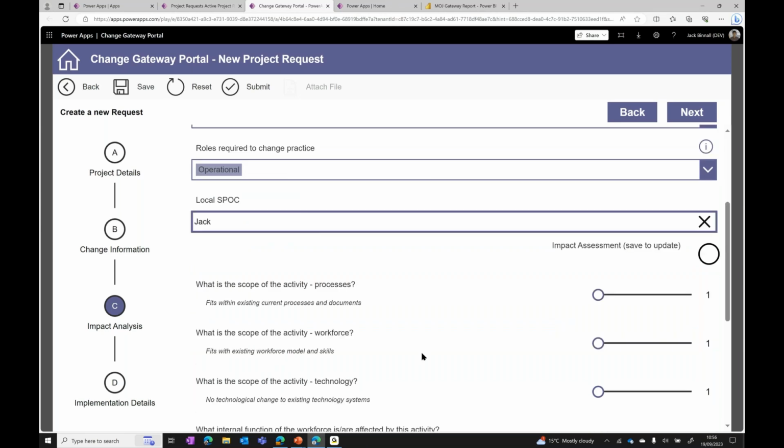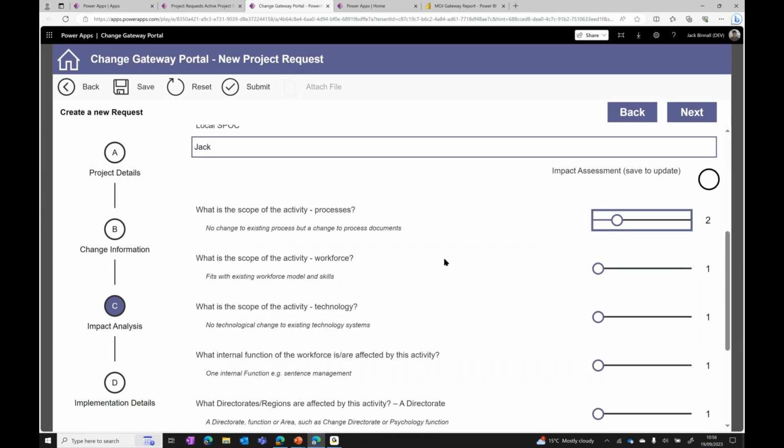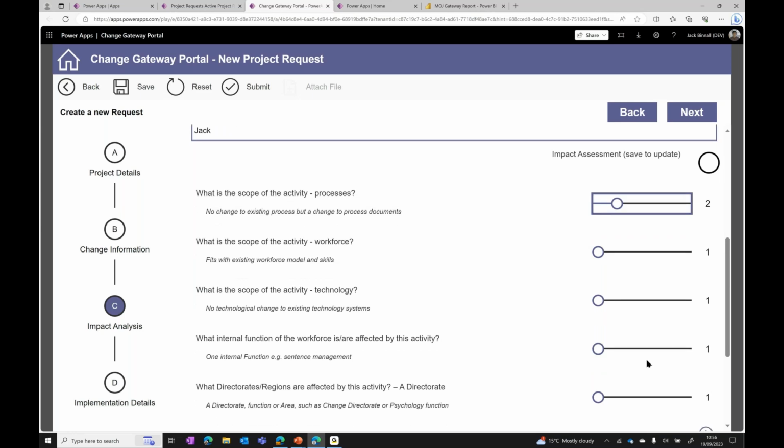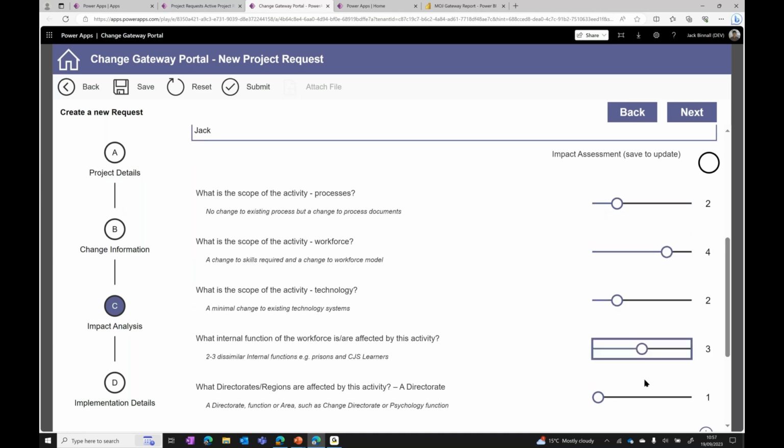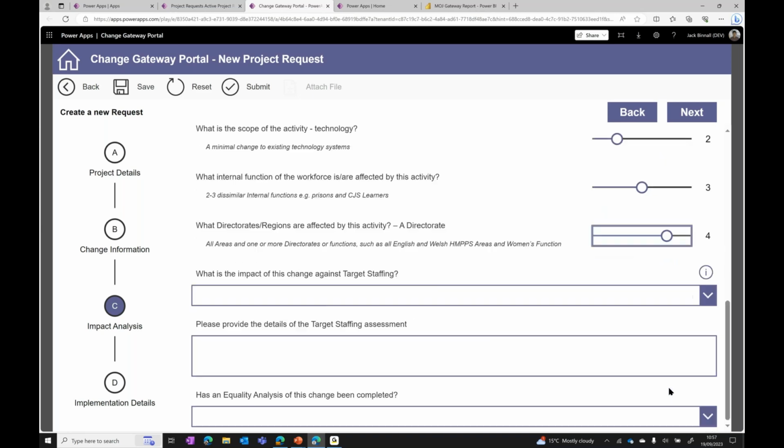Then we grab into the impact assessment stage. So for this pipeline request, a value is calculated that details how complex that project is, and that can be used in terms of the effort to implement, but also the business impact of that project. These values can be customized based on what is required, but ultimately this can be used to help generate what that pipeline looks like and the complexity of that